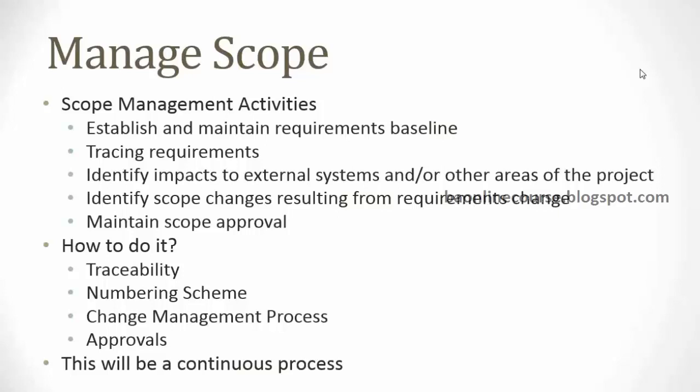And finally, there are solution requirements, which depict the system behavior and conditions, and they can be directly implemented into the system. So all these requirements, that is the business requirements, user requirements, and solution requirements, are linked together in the traceability matrix. In this way, we are able to achieve a fully traceable set of requirements. Suppose a solution requirement doesn't match either a user requirement or a business requirement, then it gets removed. In this way, we can keep track from the starting business requirement till the end solution requirements, whether we have covered the full scope of the solution. According to me, that is what comes under traceability.